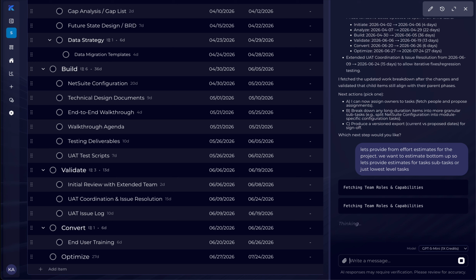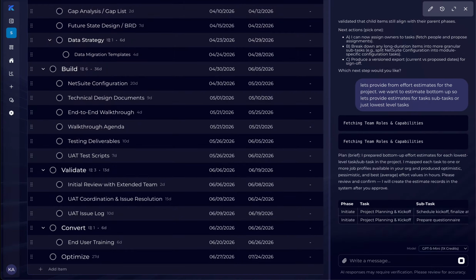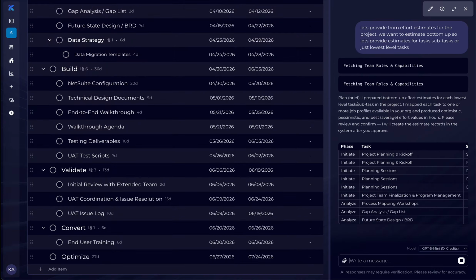And ideally, as you go through a pre-sales process, you go from top down first through the top of the funnel activities. As you go to the bottom of the funnel, you have much better sales discovery done, and now you have a pretty well-defined scope. And then you're able to take that and do a bottom-up estimate for what your team will actually take to execute the plan.